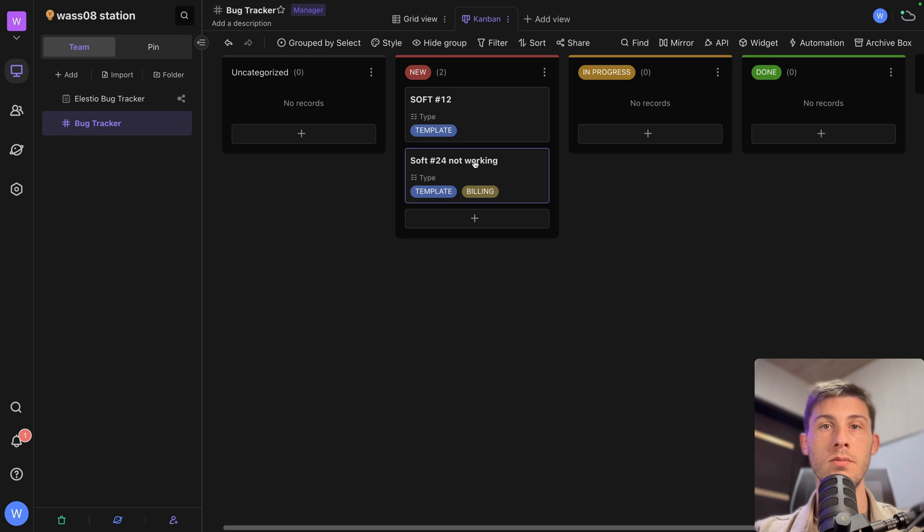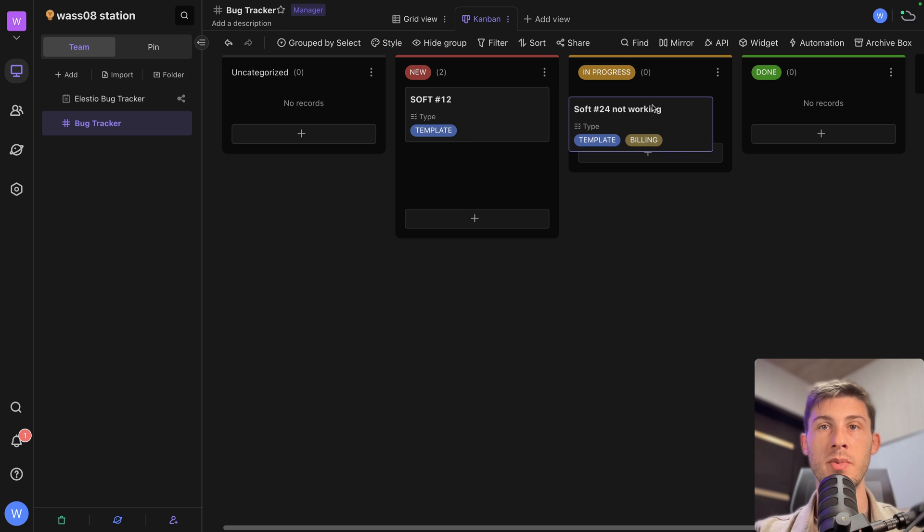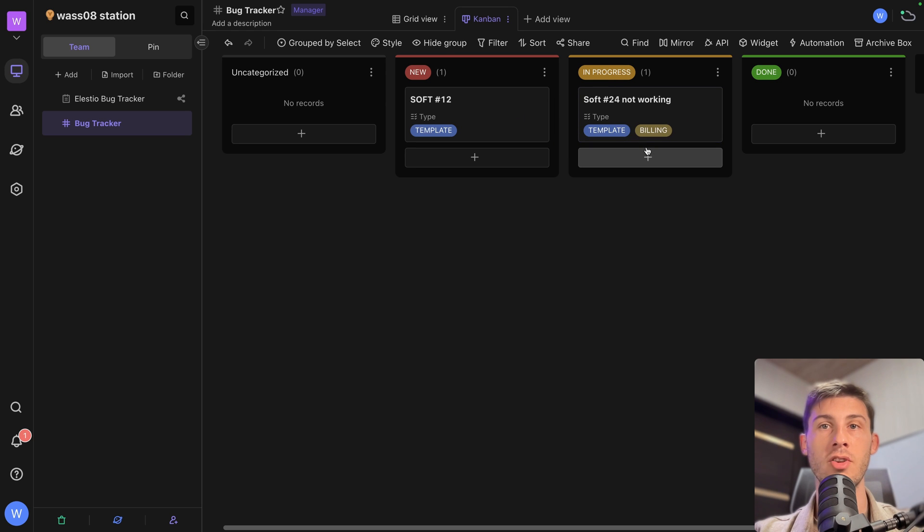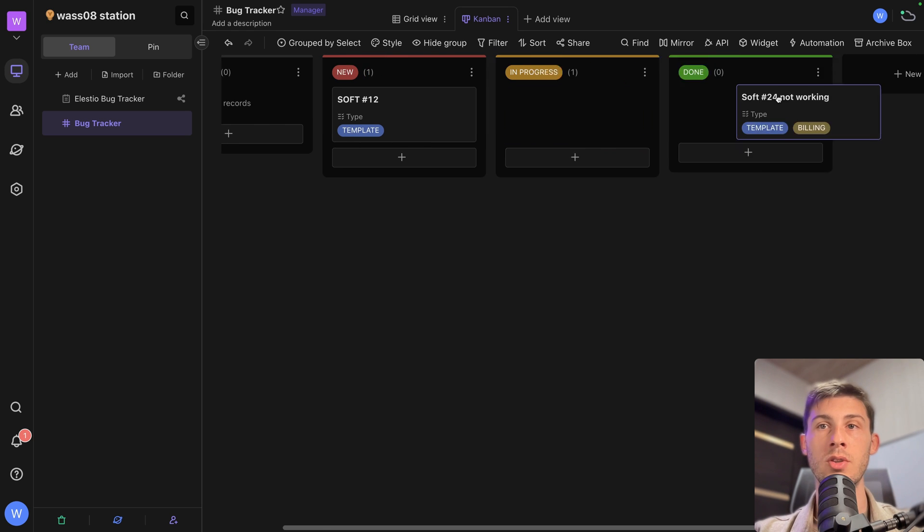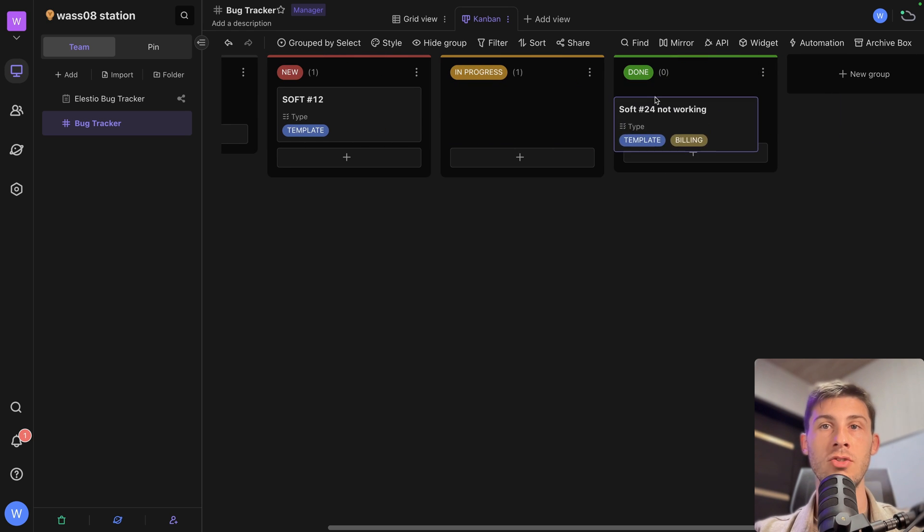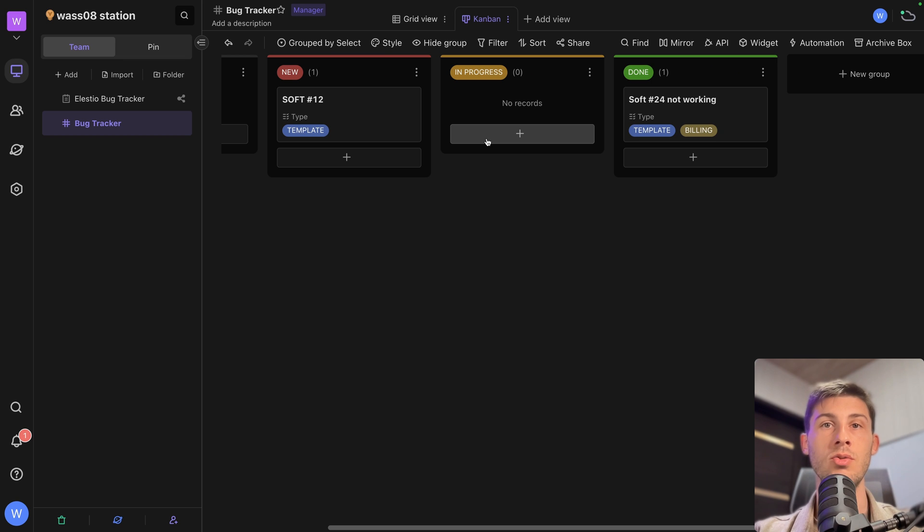Then when you start it, you drag and drop it in in progress. And once you're good, you drag and drop it into done. But you can go further. For example, you can add a widget.